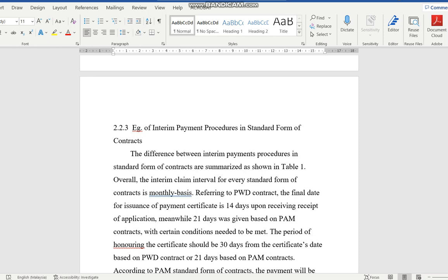Then for payment issues. Besides all the terms, these terms have a part in your payment certificates, and when you pay, there's the matter of honoring. The duty of the client is to pay within the stipulated time. The duty of the CA is to work within the stipulated time. The contractor's duty is to give a reasonable claim, and to give the claim at certain intervals.